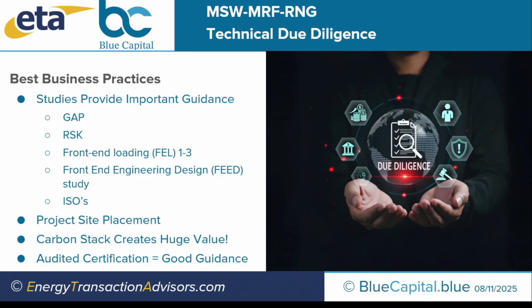Project site placement is a really important part of your due diligence, documentation, and control. The wrong site is going to ruin your project. So, we look at everything on sites, from where it is and what's going to be impacting it, from natural disasters to economics of a region to people that are available for running your facility. There are other things that go into site placement, but this is specifically about the site.